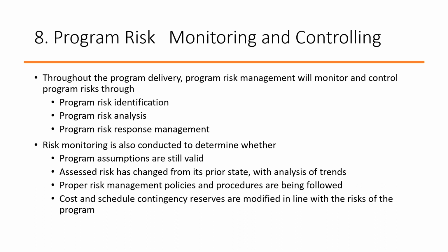Risk monitoring is also conducted to determine whether program assumptions are still valid, whether assessed risk has changed from its prior state with the analysis of trends, whether proper risk management policies and procedures are being followed, and whether cost and schedule contingency reserves are modified in line with the risk of the program.